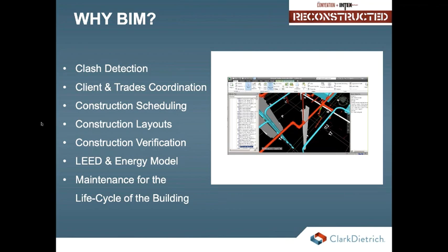So on those weekly calls, our team would sit there and say, okay, who's going to move what today? And the GC would walk through the model, fly through the model and say, okay, this is our problem today. We've got 100 problems to look at. Who's going to move what at what time?